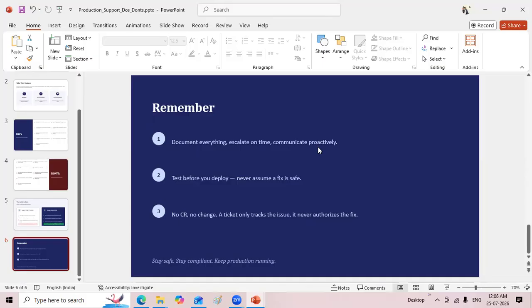It's always a good habit. As soon as a change request is raised, you have to check with the requester who has raised the change. And you have to be part of a CAB call. When I say CAB call, your change request will be discussed in the CAB meeting. They'll check who the implementer is. Do you know the proper steps? Have you done this previously? What is the impact? The implementer has to respond to these kinds of questions so that everything goes smoothly. Only then will they approve the change and it can proceed further.